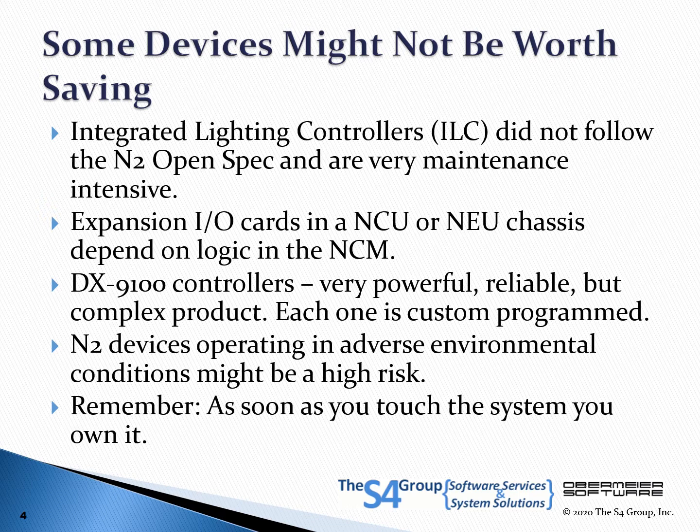In the building owner's mind, anything that happens on your watch is your responsibility, so it is best to evaluate the health and sustainability of the existing installation before starting any work. Then, you can work with your customer on how to address any repairs or replacements that need to be made up front and make a plan on how to address any issues as they arise in the future. From a business standpoint, it is a best practice to formulate the agreement in a way that carefully defines your contractual obligations versus what the building owner is responsible for.